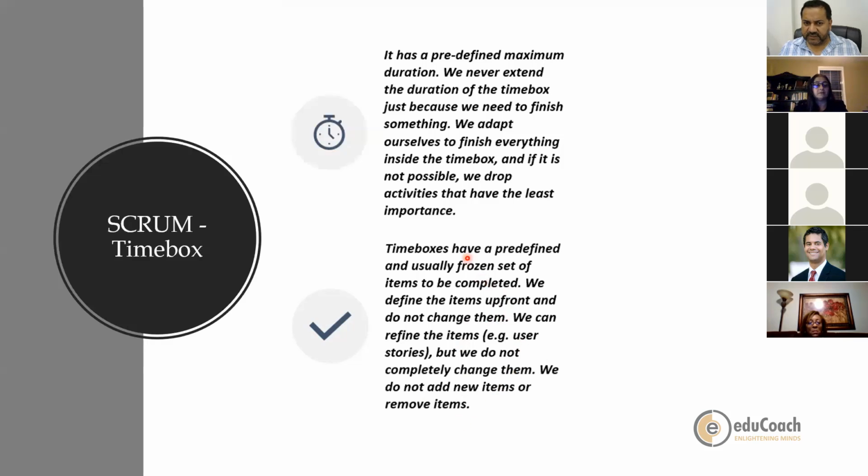So this is still an ideal story, but generally what happens is that items can be added if it feels that the number of items that this team picked up is smaller, of a duration which does not match the duration of the sprint. But one thing has to be kept in mind: whatever items are picked up have to be as per the sprint goal.